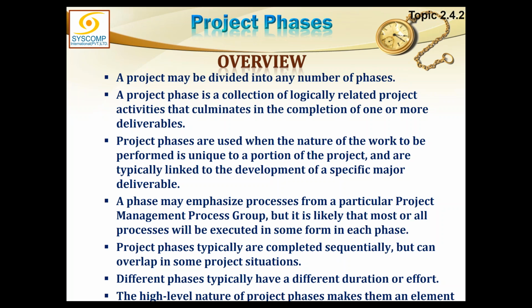But on a better assumption, if that approval is received in time and we have started the second phase already, all that work we have done on the second phase is validated. There is no problem undoing it. But in case the first phase is not approved, that may affect the work we have already carried out in the next phase. It may be trashed.